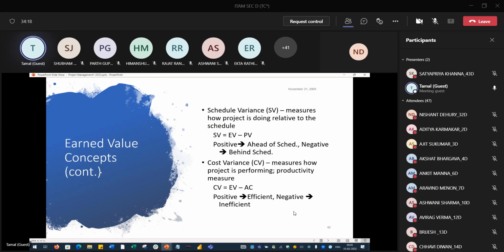I told you, all the formulas will start with EV. Remember that, otherwise it is very difficult. So schedule variance is EV minus PV, where PV is the planned value. If it is positive, you are ahead of schedule, delivering early. If it is negative, your project is late.